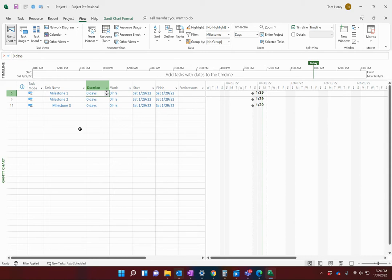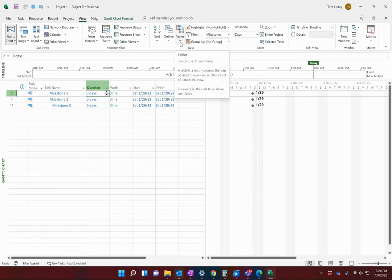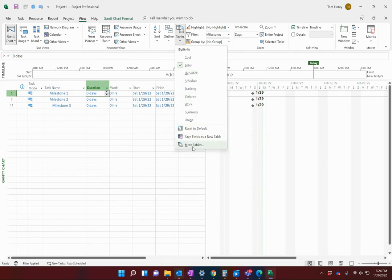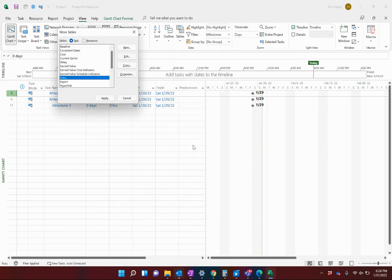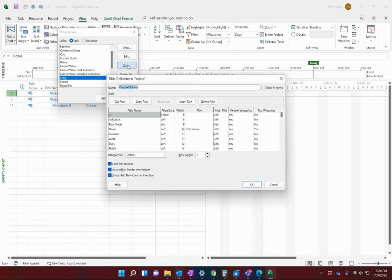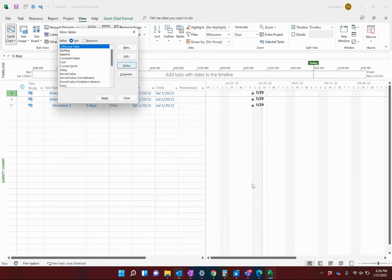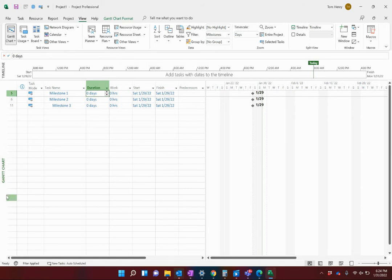Let's create that view and save it so everybody has access to it. The first thing we need to do is save the view locally. I'm going to click on Tables, then More Tables. I want a copy of the Entry table, so I click Copy and call it 'Milestone Table' — you can add an underscore prefix to identify custom items. I'll apply it, and you can see the view name on the left-hand side is Gantt Chart.